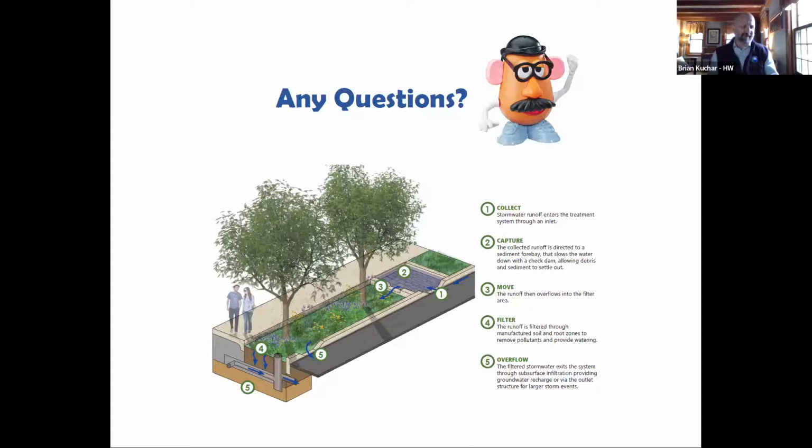Brian, do you have any data from the projects you've worked on? I think you're right on with that budget. And there's two costs you need to consider when you're talking about this type of thing. One is the cost to install it. The other is the cost to maintain it. So another part of your thought process should be, what equipment do I have to maintain this? And you should tailor what you install to the equipment that you have. You should also tailor it to the expertise of your personnel.